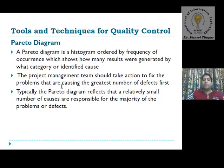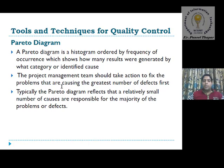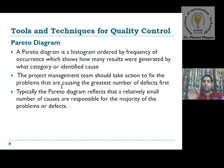Next, after control charts, we use Pareto diagrams. Pareto diagrams are histograms ordered by frequency of occurrence, which show how many results were generated by each identified category or cause. Using this histogram and frequency diagram, we can show that at a certain level a particular type of occurrence is there, and identify what causes are present at each level to define quality control parameters.